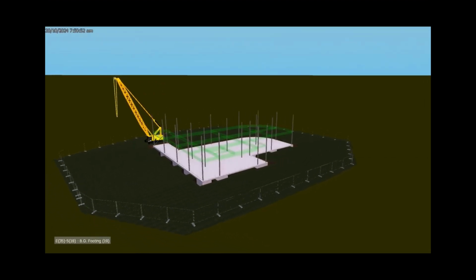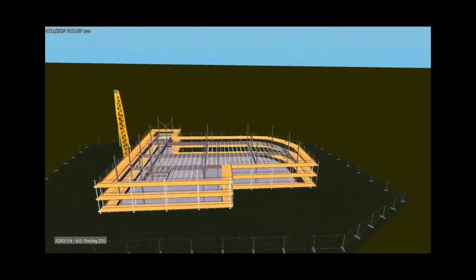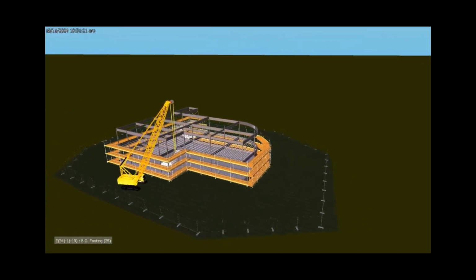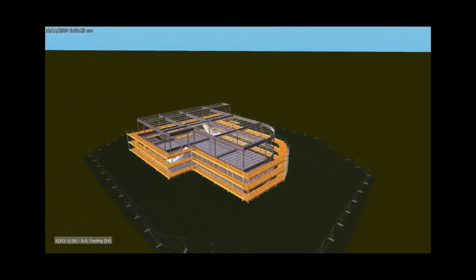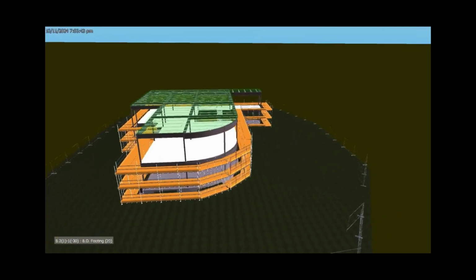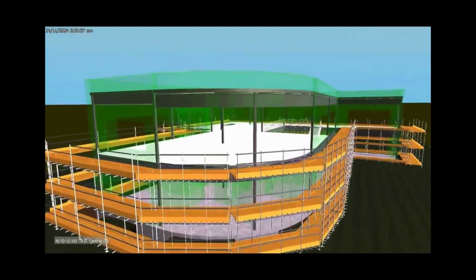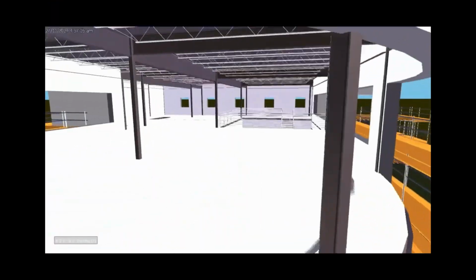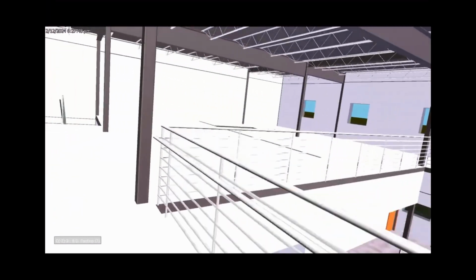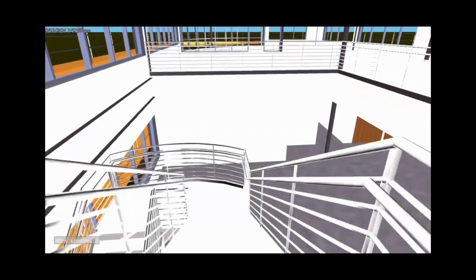To create the building from start to finish in Navisworks, we needed to create sets and tasks. From there, we set durations for these tasks based off the Aeon diagram. This video shows our building incomplete using drone-type camera shots to show both the interior and exterior features. As we can see, once the exterior walls go up, we go inside the building to see the interior layout. Finally, the camera pans out, showing the building in full.